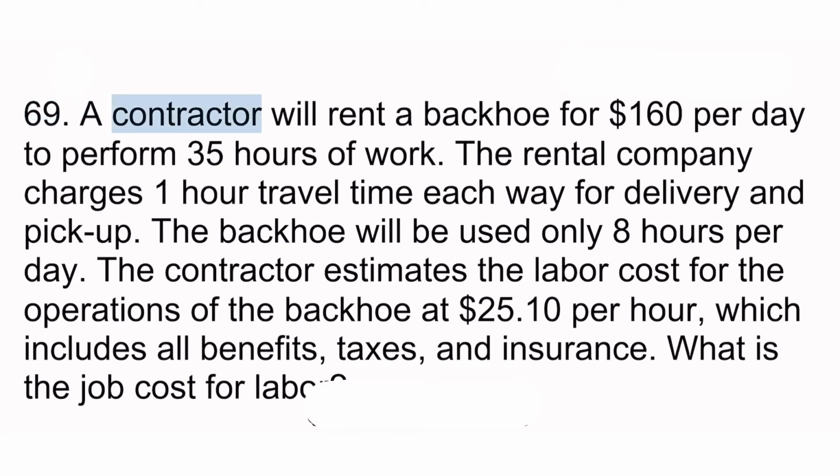69. A contractor will rent a backhoe for $160 per day to perform 35 hours of work. The rental company charges 1 hour travel time each way for delivery and pickup. The backhoe will be used only 8 hours per day. The contractor estimates the labor cost for the operations of the backhoe at $25.10 per hour, which includes all benefits, taxes, and insurance. What is the job cost for labor? Between $848 and $908.